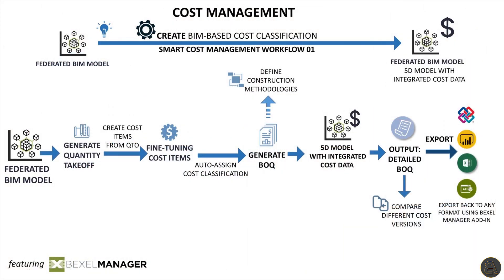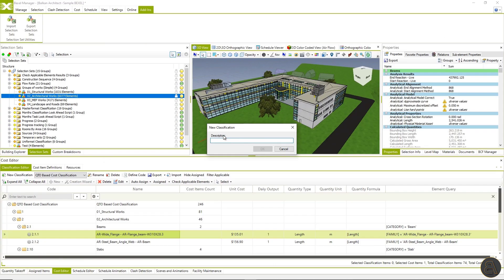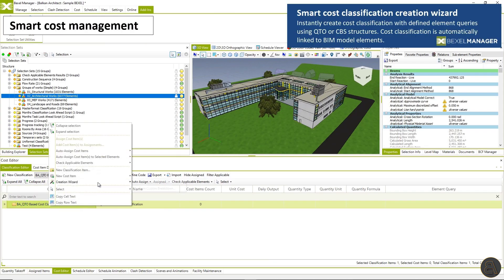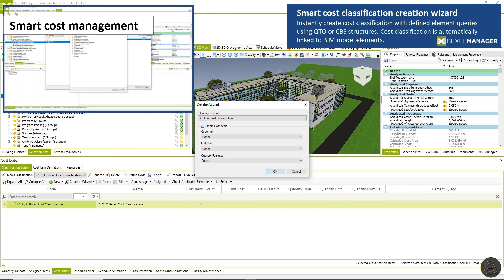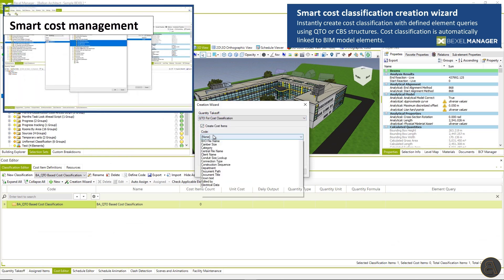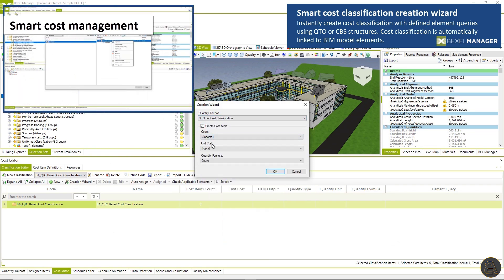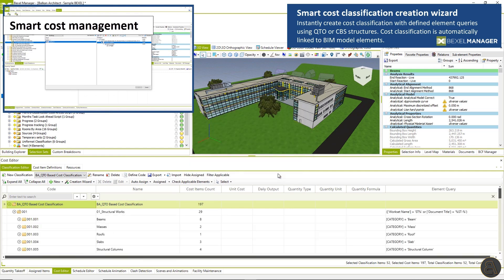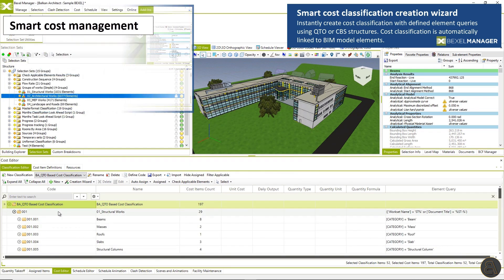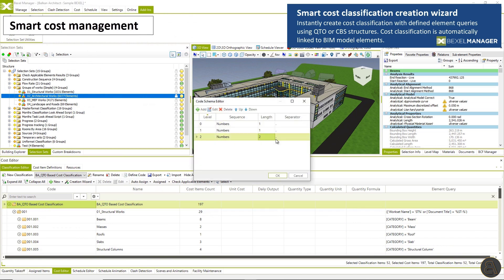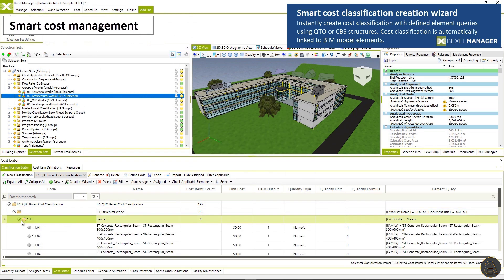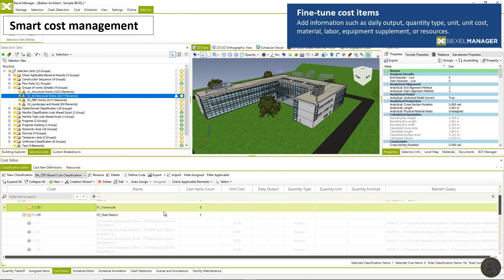Smart cost management enables the creation of BIM cost classifications. So you can create cost classification with defined queries using QTO or CBS structures. Cost classification is automatically linked to BIM model elements.